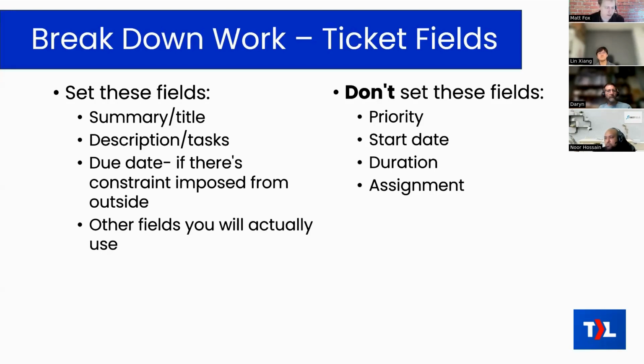Okay. Now there are some fields that you shouldn't set. So one would be priority. Basically, at this stage of the work, priority should always be just your normal average priority. We don't use priority too much in project work. That's more of a help desk thing.